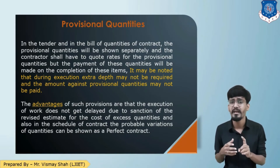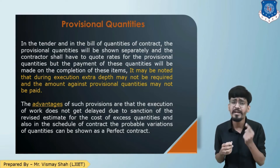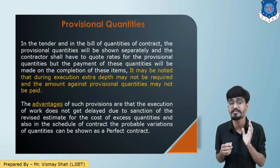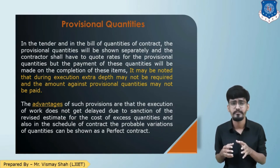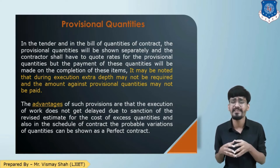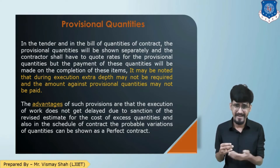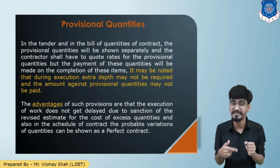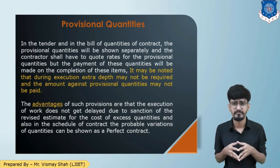The major advantage for the client in the case of provisional quantities is that by providing the provisional quantity, the client is not obligated to pay all the money to the contractor. The contractor will receive money only for the quantity he actually executes. The advantage of provisional quantity is that there will be no delay in the sanction of a revised estimate due to excess in cost. If you had not provided this provisional quantity for 5 feet and extra excavation is actually required, you need to provide a revised estimate, get it sanctioned, and then resume the work — causing chances of delay. So this is a major advantage.